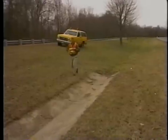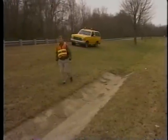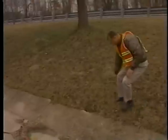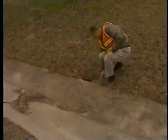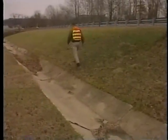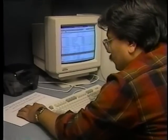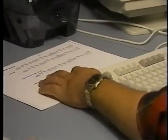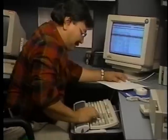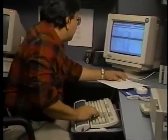Next, foremen systematically inspect roadways. This step is the major difference from the first method. Its purpose is to identify and estimate the total quantities of non-frequent and special project activities. Each area supervisor then collects the inspection data and calculates his own work program. When that is done, upper management collects all the individual work programs, combines, reviews, and approves them as one work program.